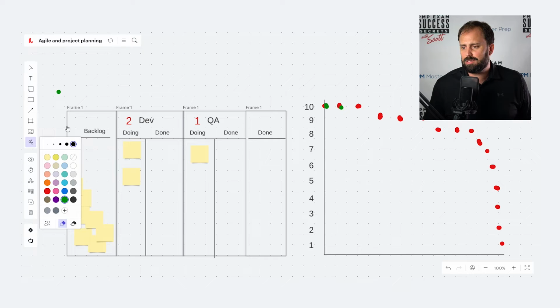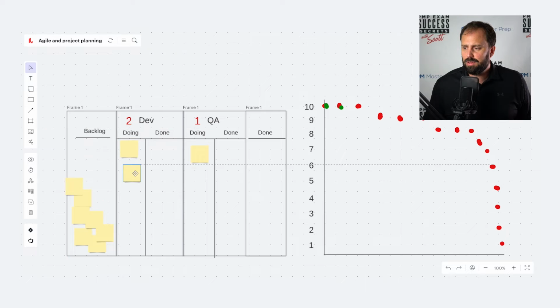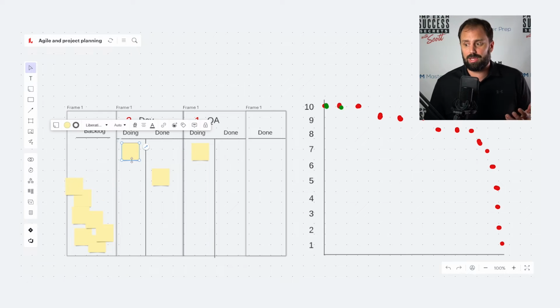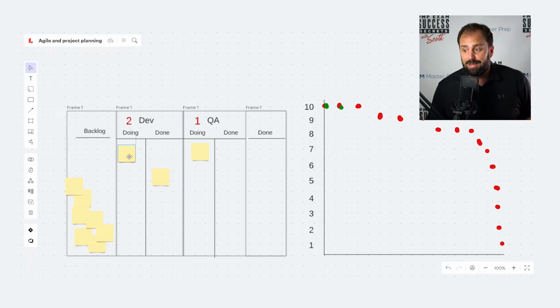As we go into day 2, let's think about what happens. This is a new job. This is a job here that's done in a sense, but we've put a WIP limit here that we can't bring anything more. 2's got to be in this entire bucket. That's the max. So this dude is done with his work, because he delivered this one, but the next day he can't do anything because there's no place to put it over here. So what would he do? Well, he could decide to help this dude do his work in a thing called pair programming, potentially, working together. He could be like, I can't take on a new job, but there's nothing to say I can't help you. So he could help that get done, which is cool.